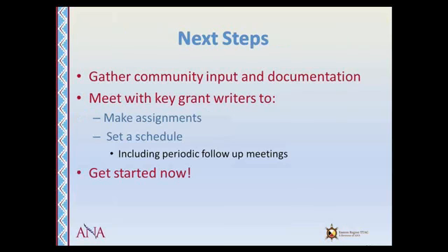We have covered the basic steps that need to be accomplished before the actual application writing begins. Documentation of community input is required. You have a finite time to put together an application. Therefore, we suggest developing a timeline and making assignments so everybody working on the application is clear about their duties and due dates. Depending on the scope of the project, it could take a year or more to gather all the required planning documentation. Then, of course, there's the writing, which can take several months. Don't procrastinate. Get started now.